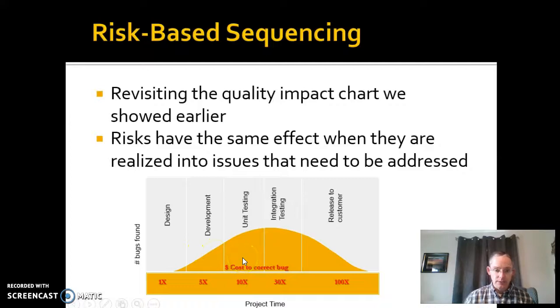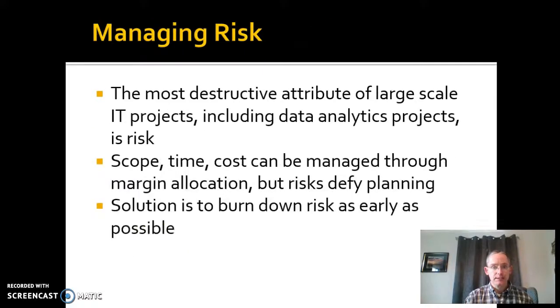That way, when you go through the CCB, if a change comes up during unit testing or development, you can go back through the CCB and say, do we really need to do this? And if we don't, we don't touch anything, because it would drive us back to do that unit testing again and some system level testing and some huge expense. That's why the CCB is in place. There are times when you have to, right? There are things that you found or good ideas that have come along that, if we look at it and say this really wouldn't cost that much and it would improve the acceptance criteria, then you can go ahead and do that. But make sure we're controlling it.